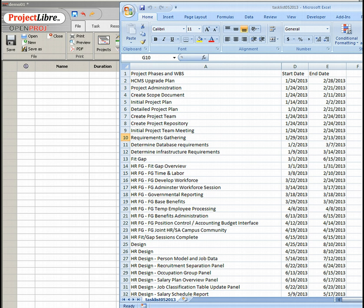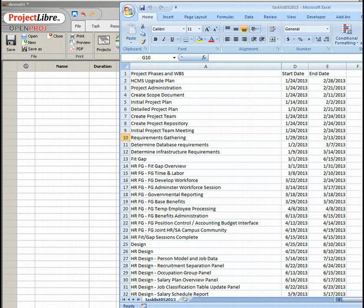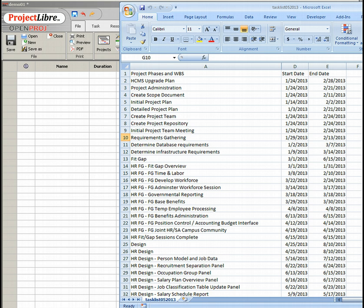Project management software is basically a specialized spreadsheet application. And oftentimes it's best to start with a spreadsheet in terms of roughing out project phases and work breakdown statements that make up a project. Here we see an Excel worksheet where we've roughed out some initial planning and project team related phases along with some fit gap and design work breakdown statements in those respective phases.